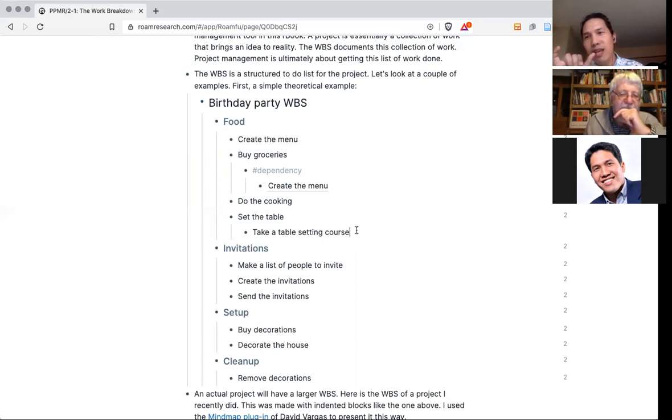For instance, I'd like work packages to be completed in a week if I'm assigning it to someone, because normally my project meetings are weekly. It depends on how fast the project is, but normally it's weekly. So when I ask someone, okay, how is it going,